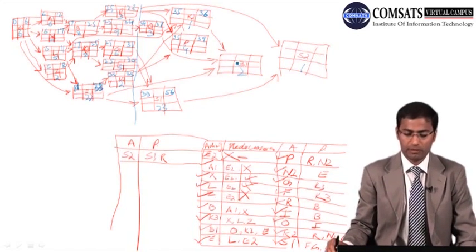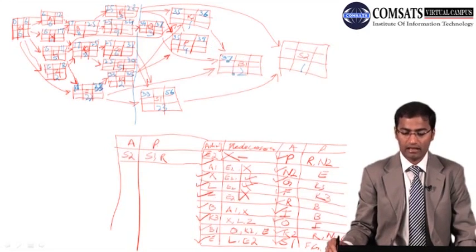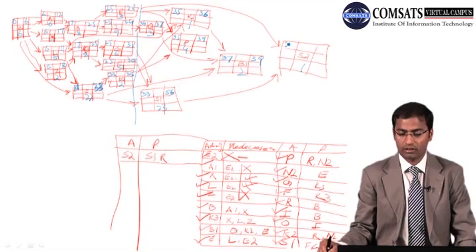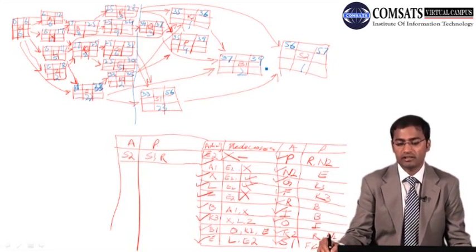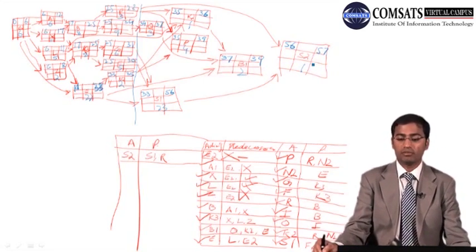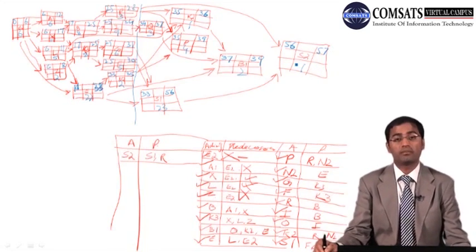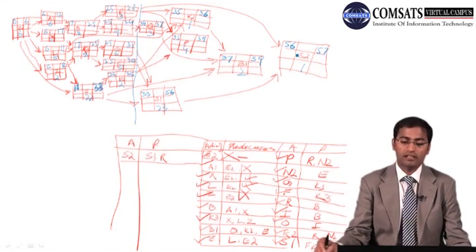And activity B1 is dependent on 37, 36 over there, and 33, so we will take 37, and 37 plus 2 is 39, and this 56 will go over there, and 56 plus 1 is 57. Now this has been completed. This is an open-end activity, this is an open-end activity. Both activities have no relationship with each other, but this is the forward pass. Now we have completed our forward pass.